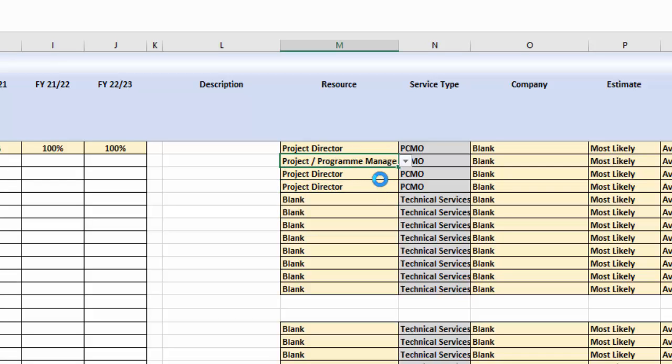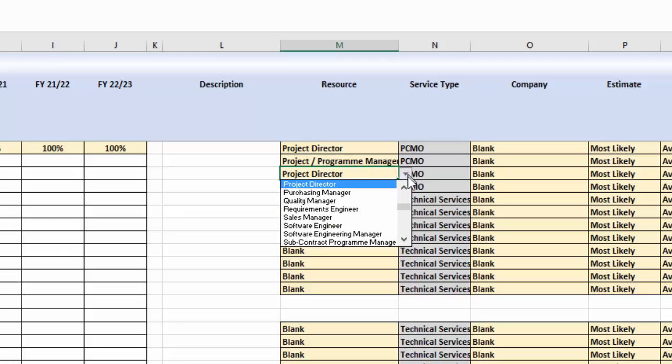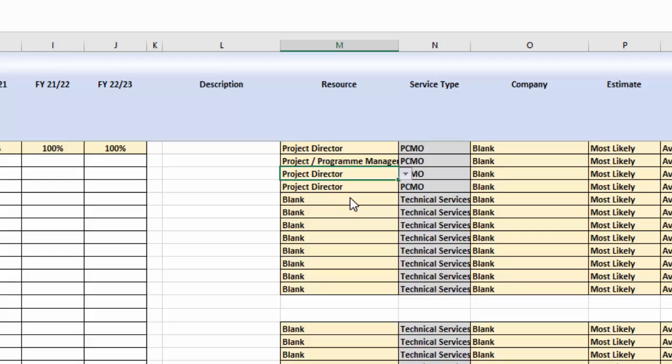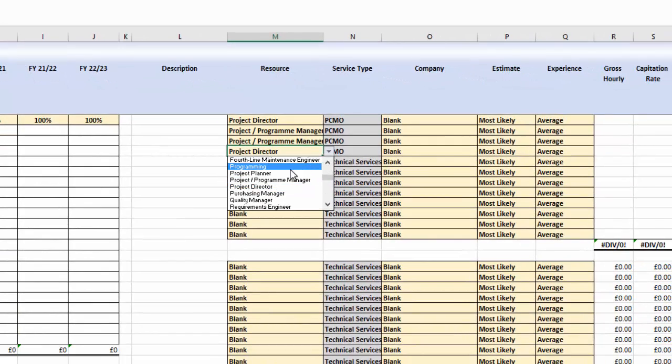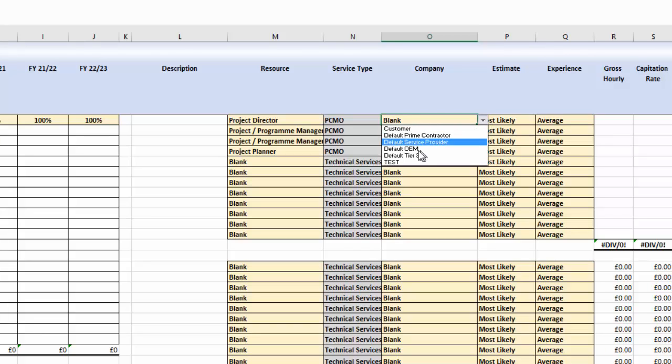So, for example, it knows how much more the southeast of England is in terms of what wages are compared to the national average. And we just gave it that kind of company overhead structure that we were just looking at there. So what it's going to do now when I give it these different inputs is that it's going to take the salary data that it has and it's going to turn that cost base into a price based on the default overheads that it has.